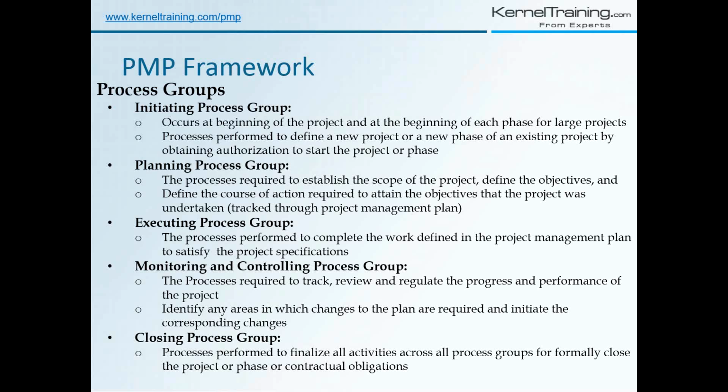Now, in the initiating process group only, once you have a project charter, you come up with your stakeholder register also. That is identifying all key stakeholders, all stakeholders in the project, negative or positive, right? Plus, these two are outputs from the initiating process group. Once you're done with these two processes, there are only two processes out of 47. There are only two processes in the initiating process group.